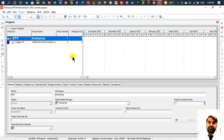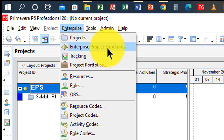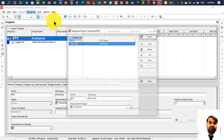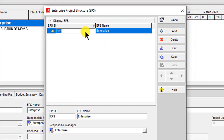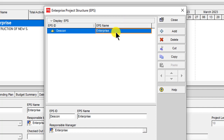We will use the path to create EPS: go to Enterprise, then Enterprise Project Structure. Here you will add your company ID and company name first. The ID should be something like 'Descon' and the name 'Descon Engineering'.